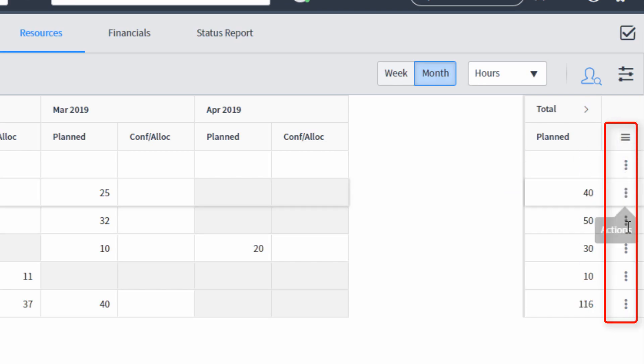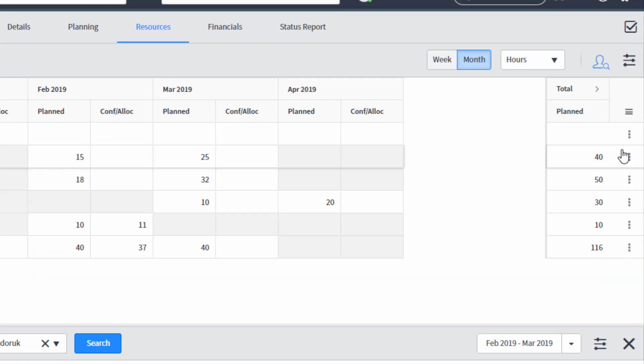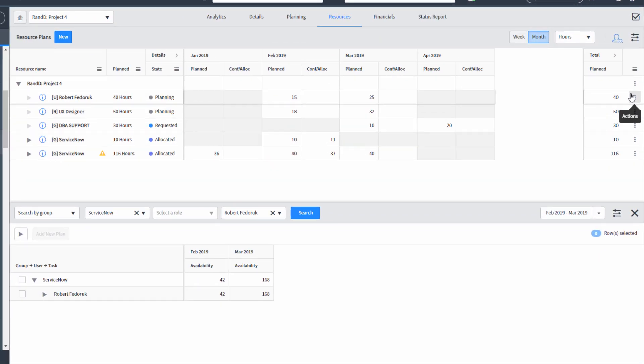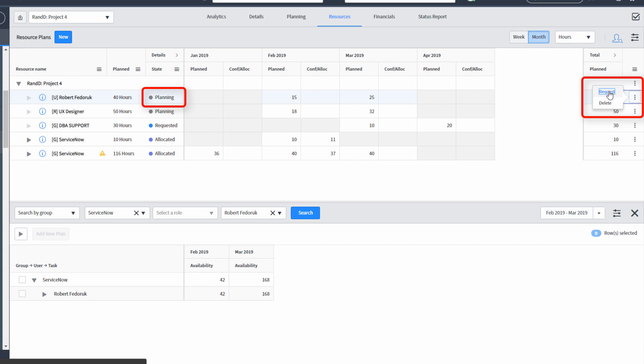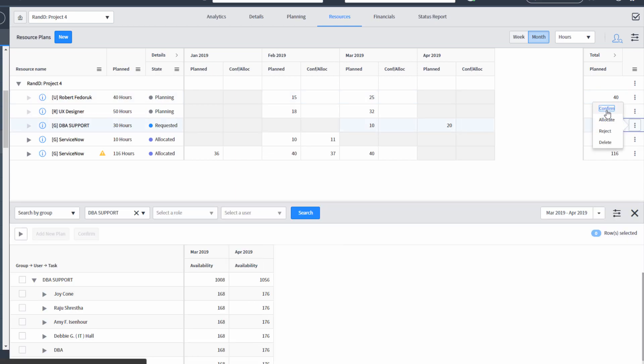We also have an action bar, and depending on the role you have, this can do different things. For example, if you're a project manager, you can click the actions and you can move a resource plan from planning to request. Likewise, if you are a resource manager, you can confirm or allocate or reject a resource plan from that little action bar.